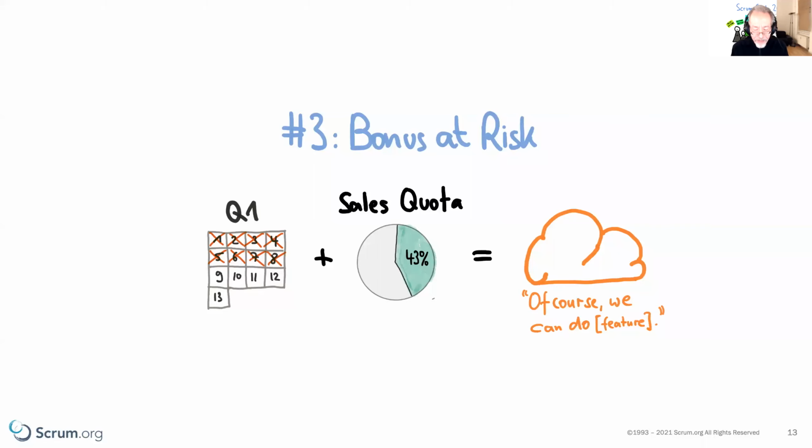Now, how can you figure out what is going on there? When I go through a product backlog and have a look at the items, what I also try to understand is, okay, what was the lead time of a product backlog item? So when was it added to the product backlog, and when was it actually delivered to the customer? And it's really interesting to see when things come up that have a very short lead time. So of course, a priority 1 bug has an ultra short lead time, and it's supposed to be that way.